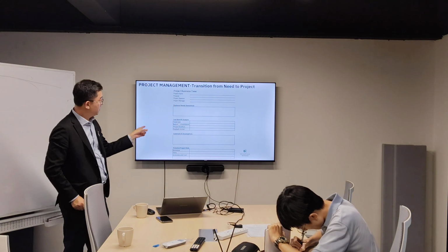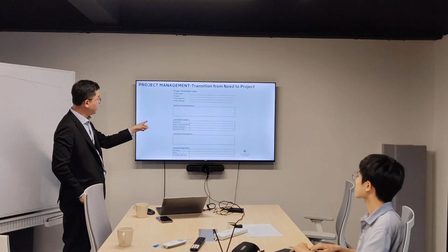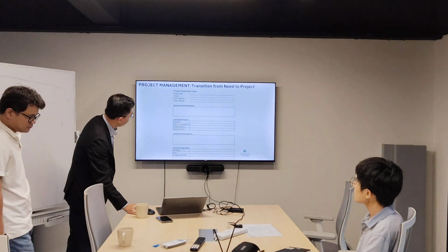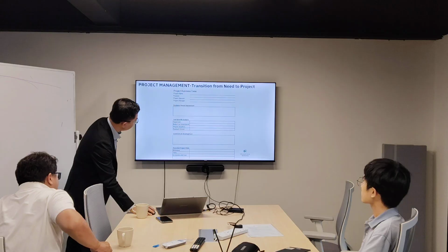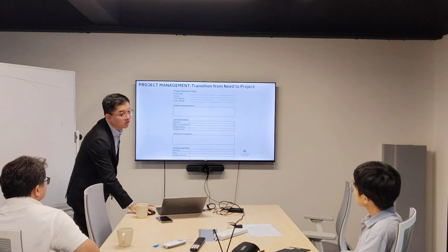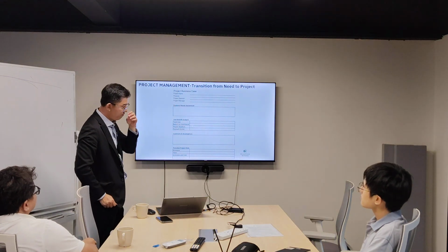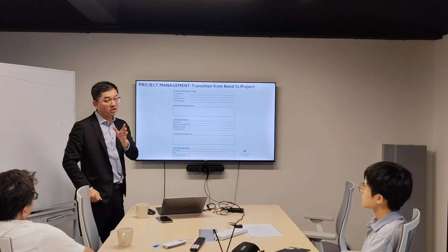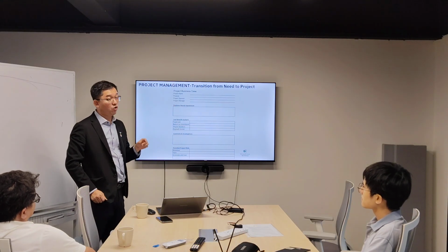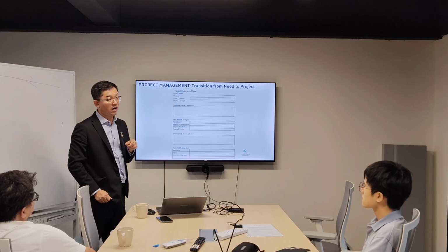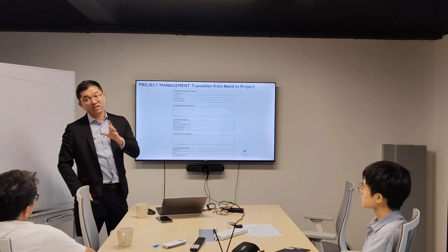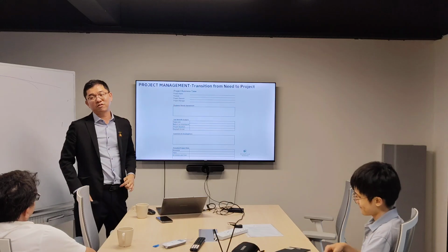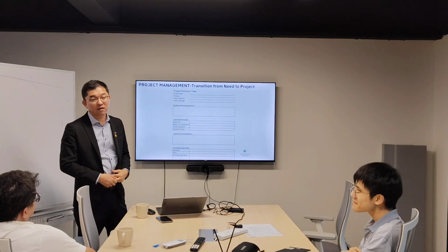Meaning that the conclusion is the total cost that you invest and what is the return on the investment. As we mentioned in the morning session, the return on investment should be a maximum of 7 years or less than 7 years. Then that is only considered a good ROI. If ROI is more than 7, better don't invest. You put into FD, better.